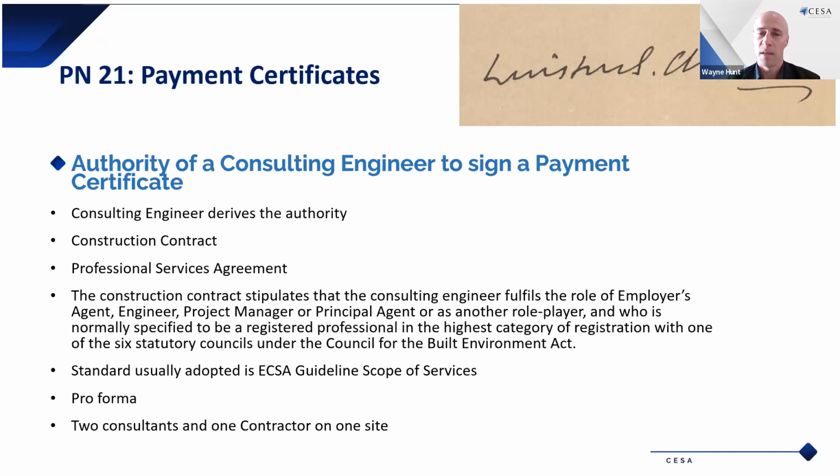Yeah, so it is not that plain and simple when it comes to insurances, liability, and site safety, because the contractor doesn't separate. In that case, it was one site to him. So if somebody walks from our road underneath the bridge of the other road, where do the battery limits of each of the projects end? The best way to do it is to define the sites, the battery limits, where one job starts and the other one ends, and manage it as best as possible.